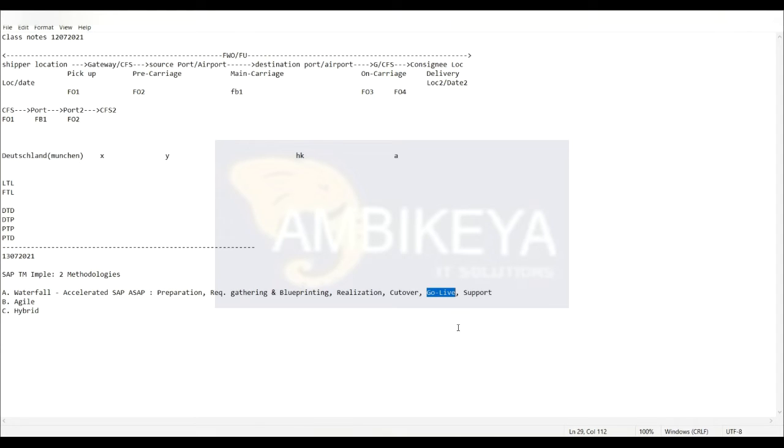Let's say priority 1, priority 2, priority 3 tickets. They are defined on a specific SLA, and the tickets that are raised need to be resolved accordingly. Otherwise, there is a penalty provision on that. Once the go live happens and the hypercare support ends, after a couple of weeks or more, ultimately you hand over the solution to the customer.